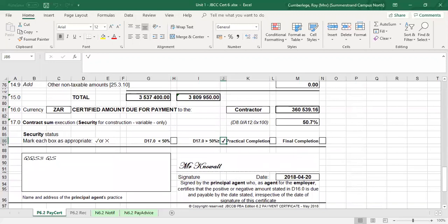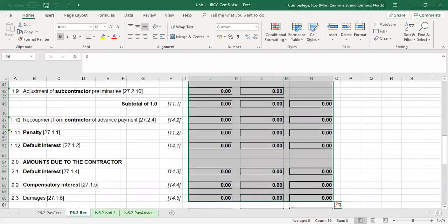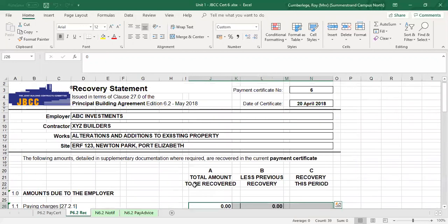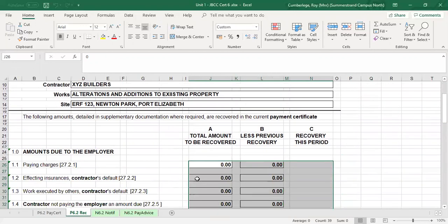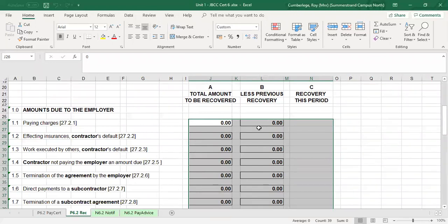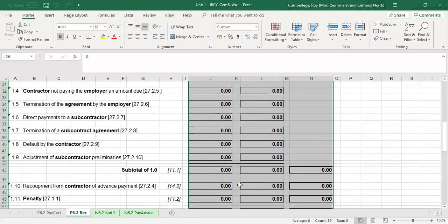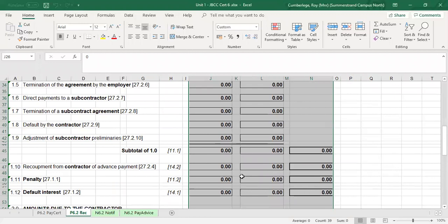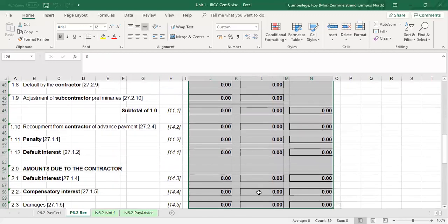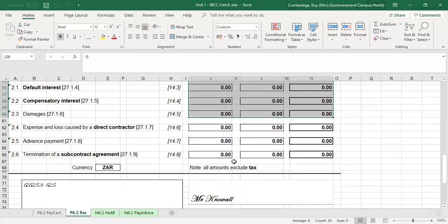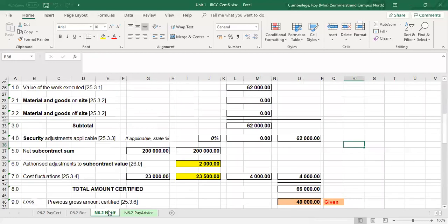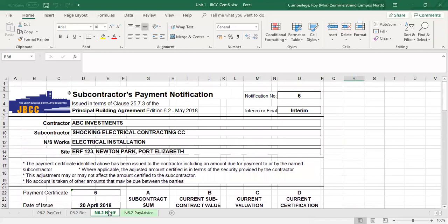That covers the main contractor's certificate — you sign it and forward it to the principal agent. Looking at the recovery statement, all the details are the same. In this particular exercise, all relevant items show a zero amount because there were no direct payments and the previous certificate was paid on time, so all values here are zero.